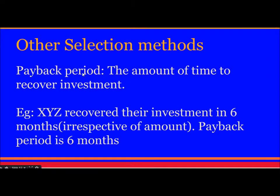Another selection method is Payback Period — the amount of time to recover an investment. Example: XYZ recovered their investment in 6 months, so the payback period is 6 months. Irrespective of the investment amount, only the period matters. Even if one project requires $20,000 investment but recovers it in 6 months versus another with $10,000 recovered in 1 year, the 6-month project is better. The lesser the payback period, the better the project.